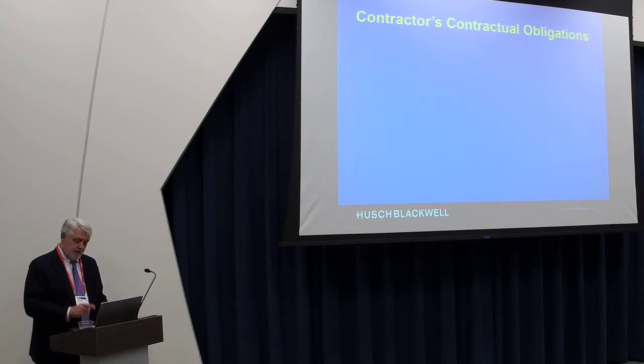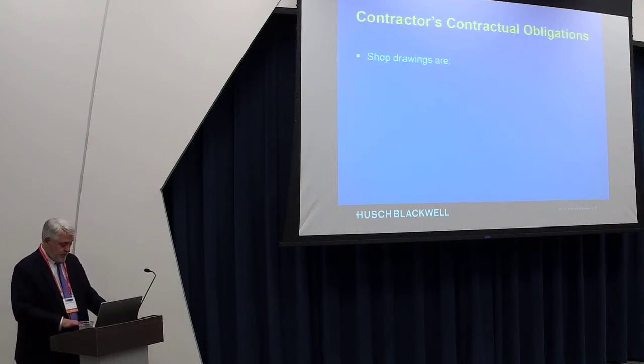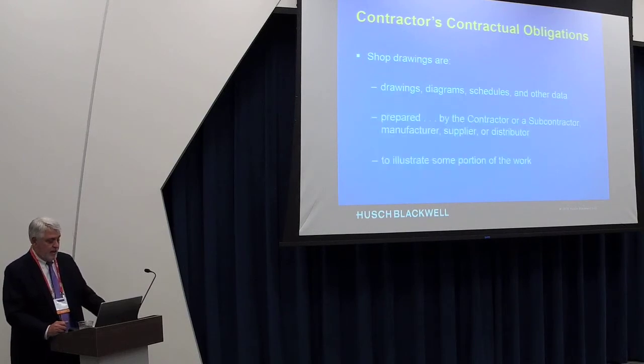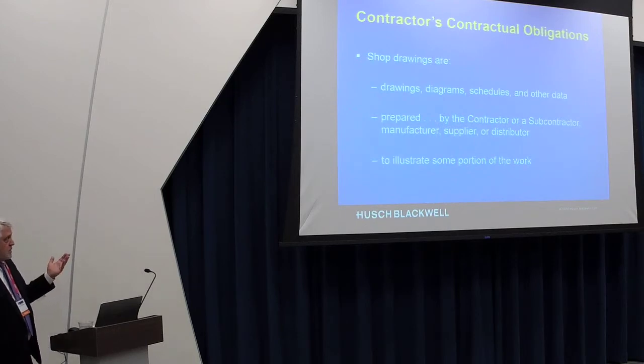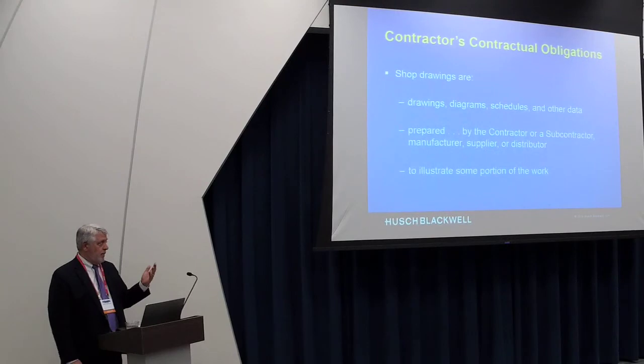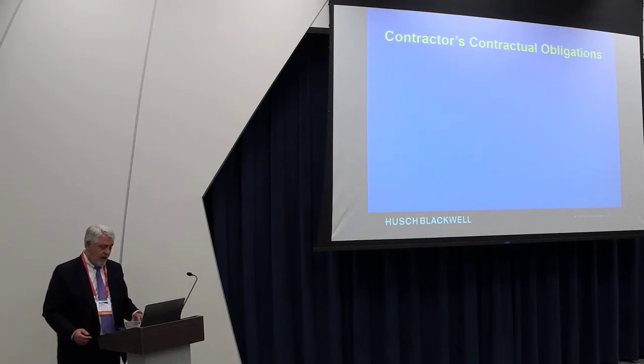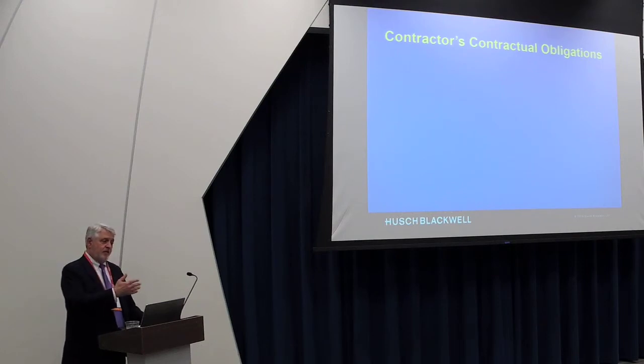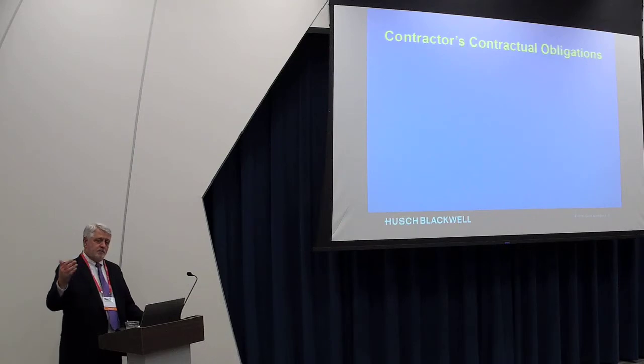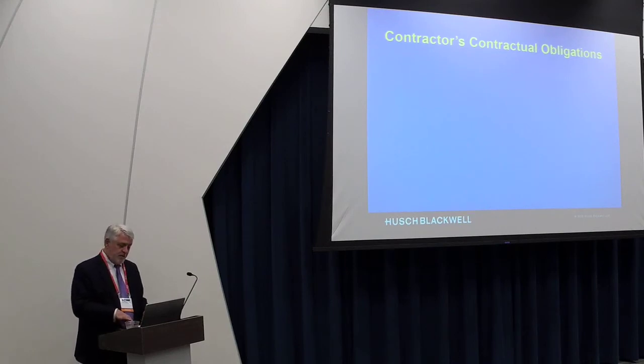When you're talking about submittals under the AIA, the contractor's obligation is significantly more than the designer's obligation. The contractor has to prepare the shop drawings, which could be drawings, diagrams, schedules, and I know you know all this, prepared by a contractor or a subcontractor or a supplier to illustrate some portion of the work. They provide that illustration so the design professional and the design professional's client, the owner, knows they're getting what was specified. It's a way of communicating on the project to make sure that the contractor is going to deliver what he promised he would deliver when he signed the contract document.